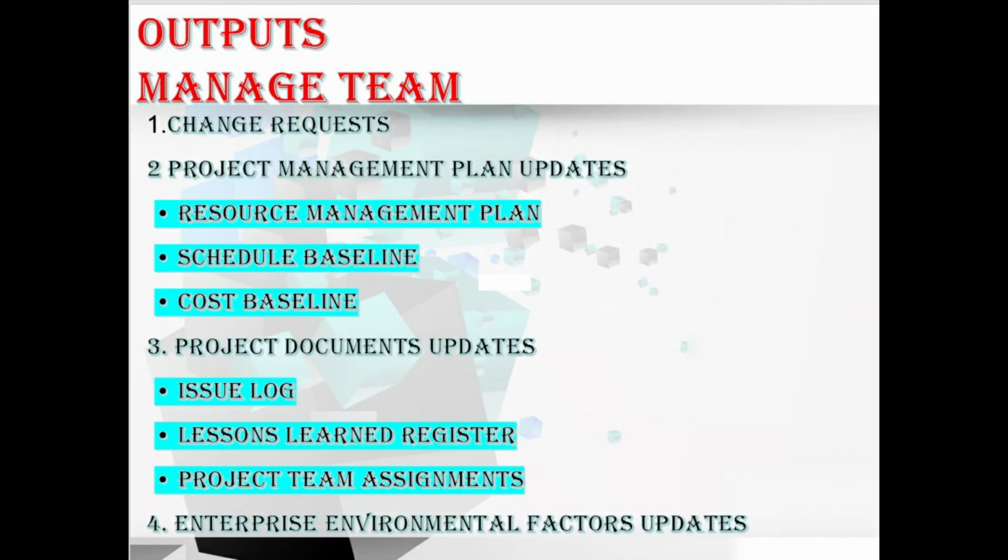In the outputs, first we have the change request. As I explained earlier, when change requests occur as a result of carrying out the manage team process, or when recommended corrective or preventive actions affect any of the components of the project management plan or the project documents, the project manager needs to submit a change request, and it has to go through the PICC process, that is Perform Integrated Change Control process. Hope you understood this.